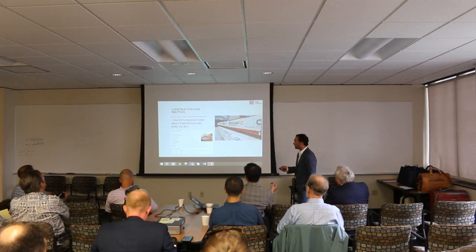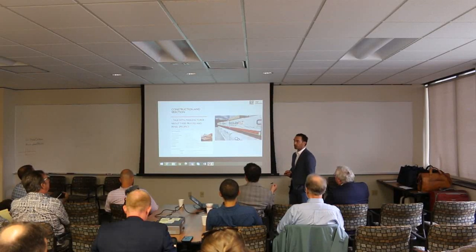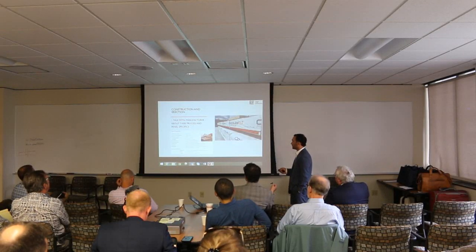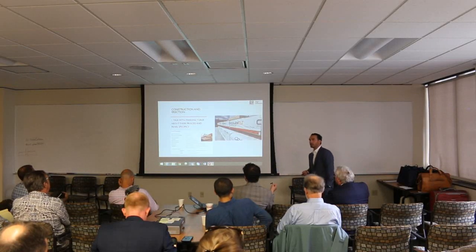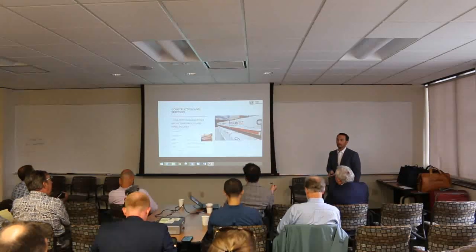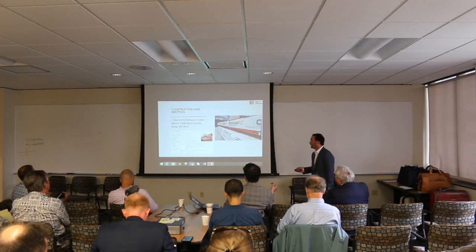The other great thing about the manufacturer is that I'd recommend you talk to them early on in the design process, because everybody builds their panels different. Their widths, their thicknesses, their types of panels. Design your building around that to utilize it to the most for cost and construction sequencing.